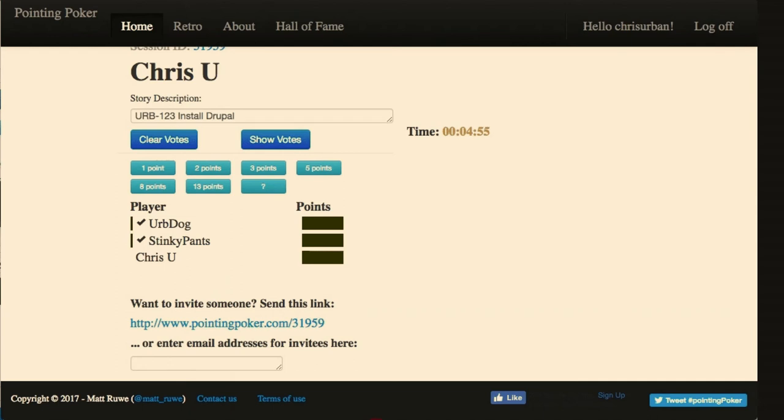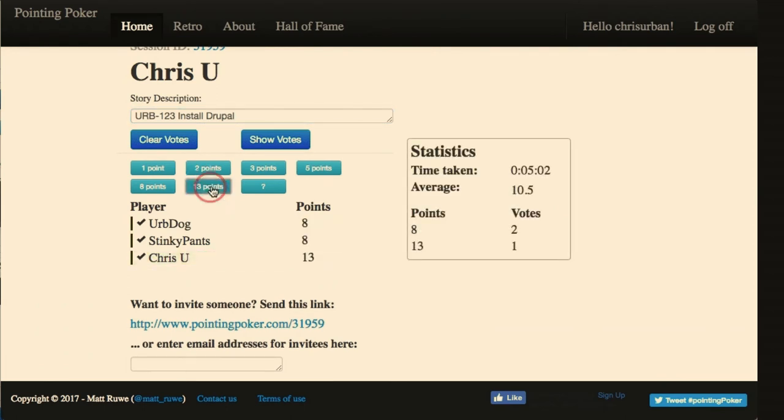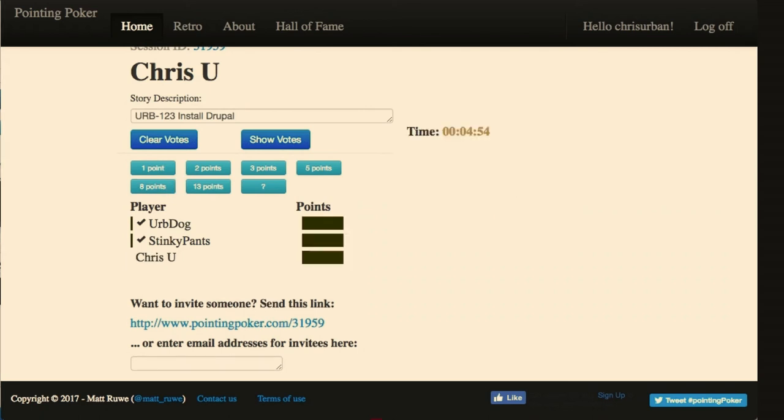This also gives the product owner understanding of what's next in the queue. If it's a lot of ones, that means there's a lot of things that can be done. But if something is really important and it's an 8, they have to be able to know to say, hey, this means all these other little things have to wait until this one's done, because this is going to tie up my team or tie up this one person for a while. So I would argue that it's still worthwhile doing.